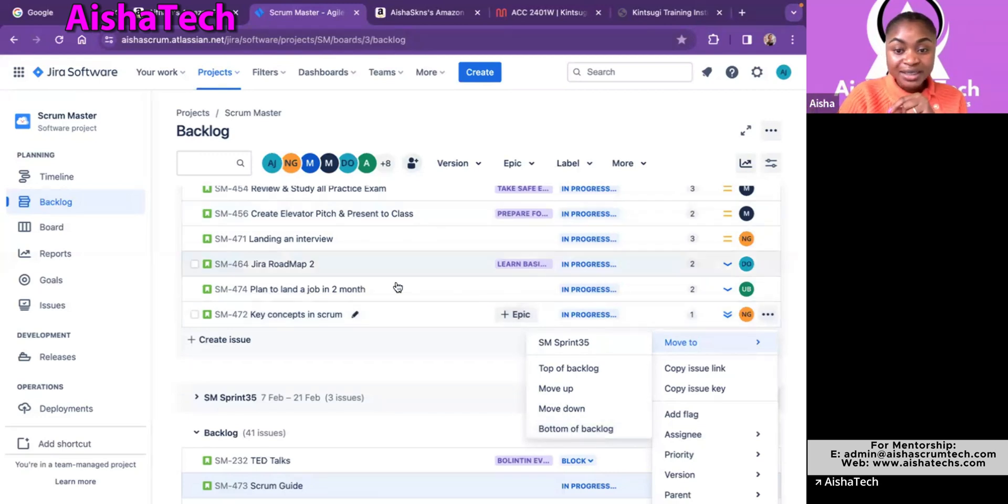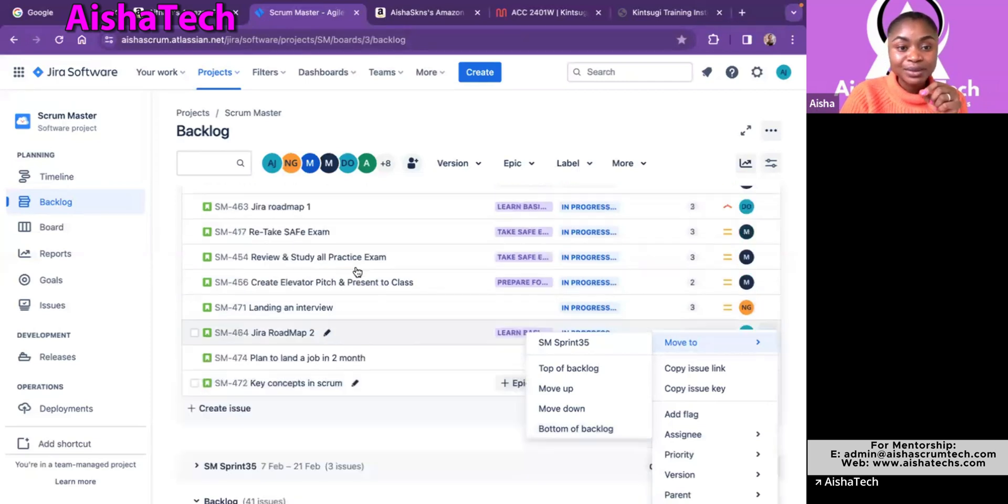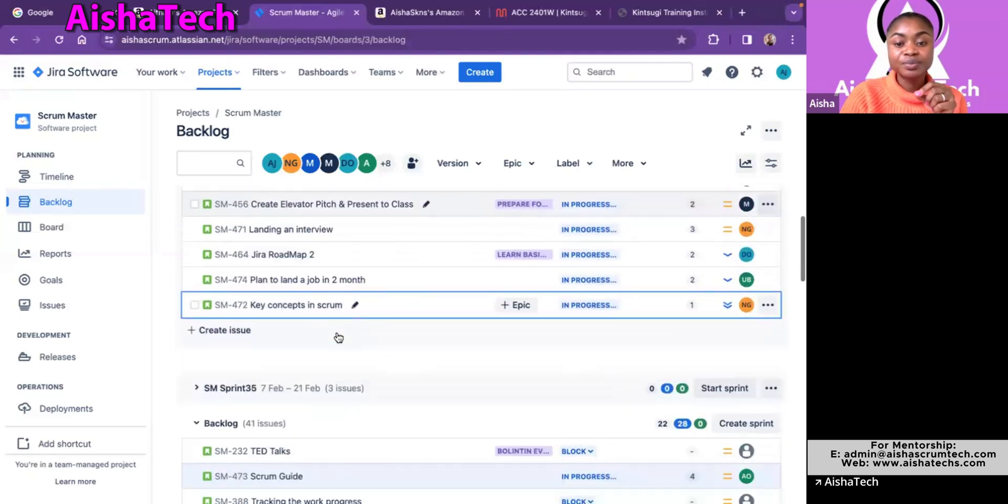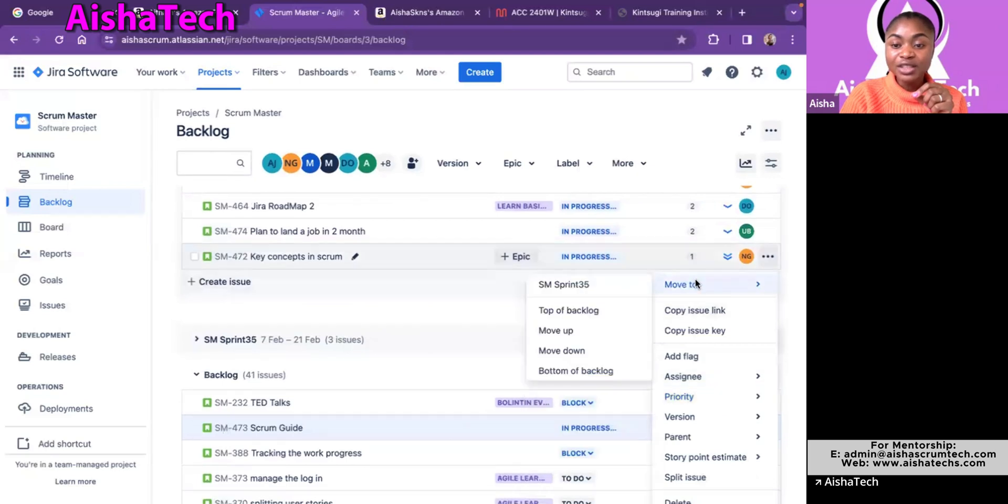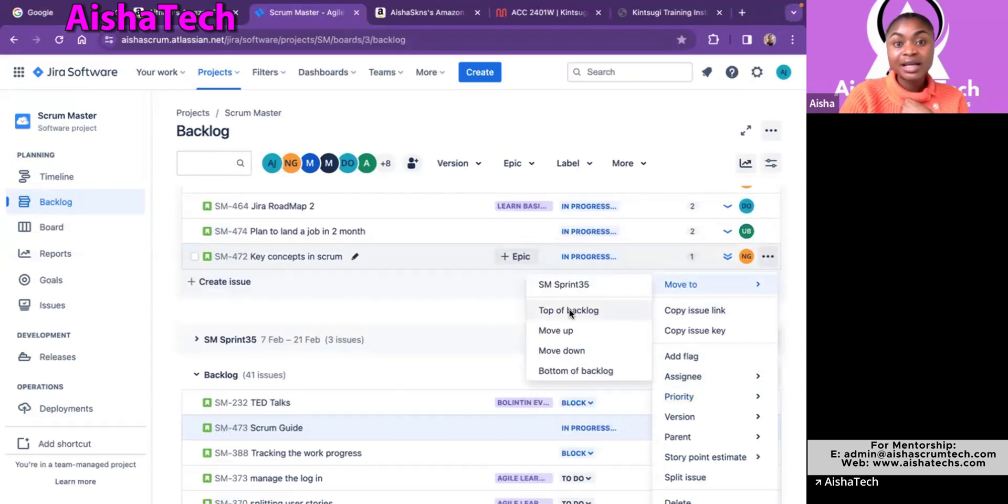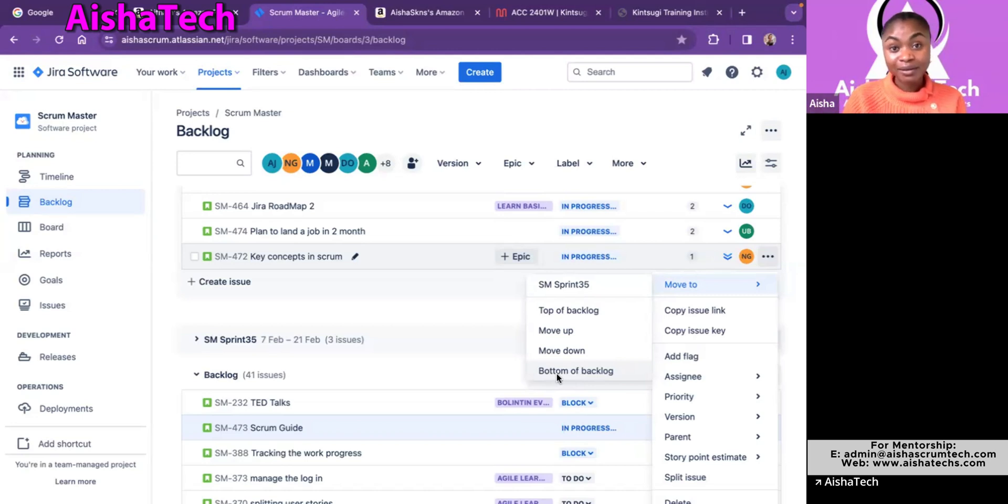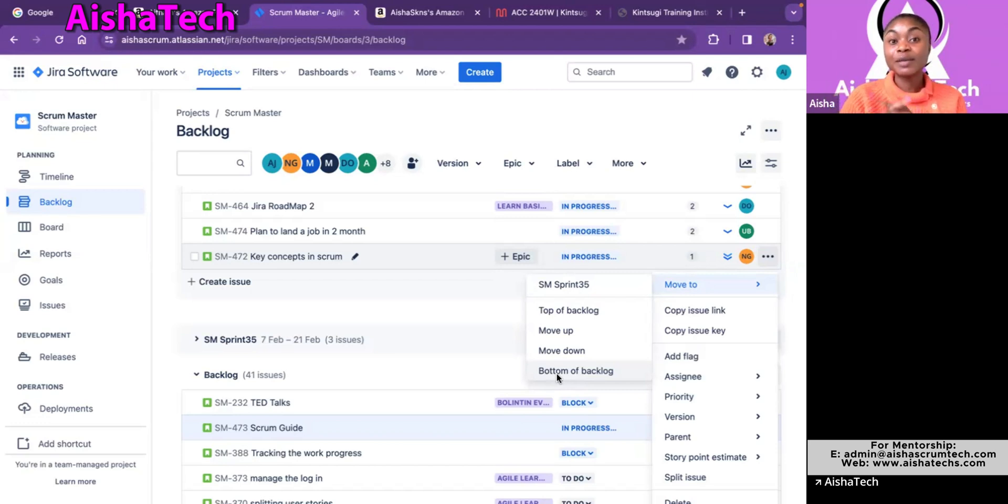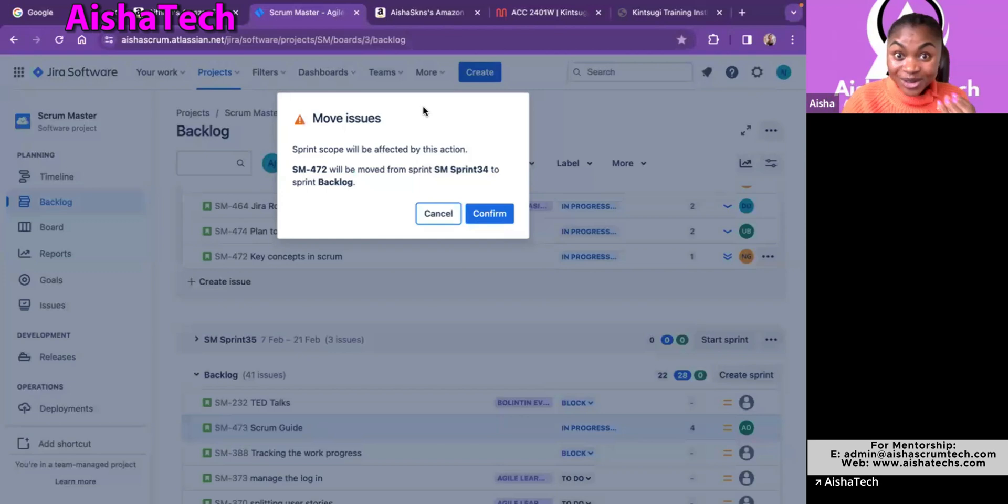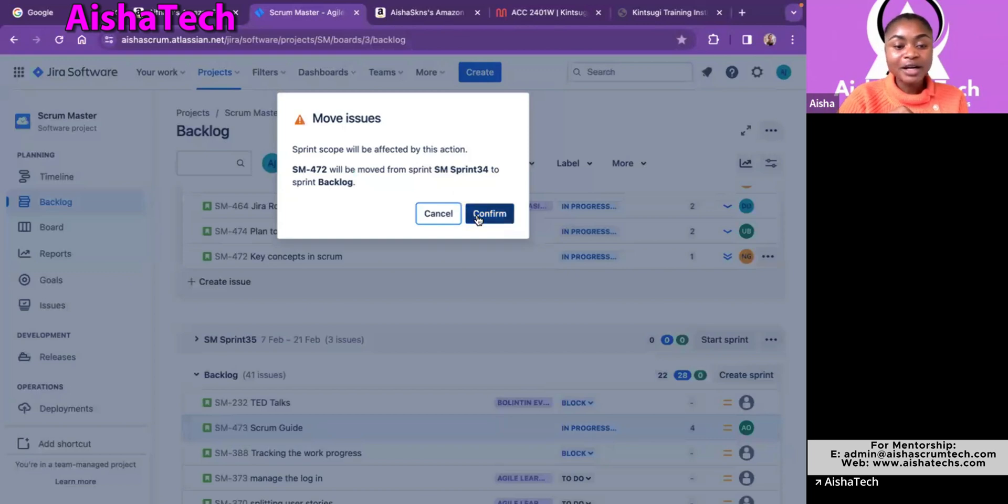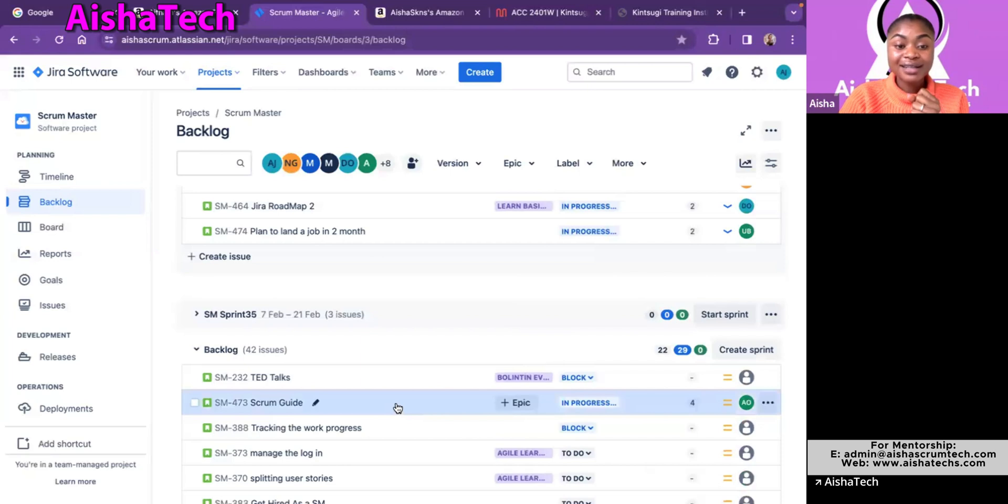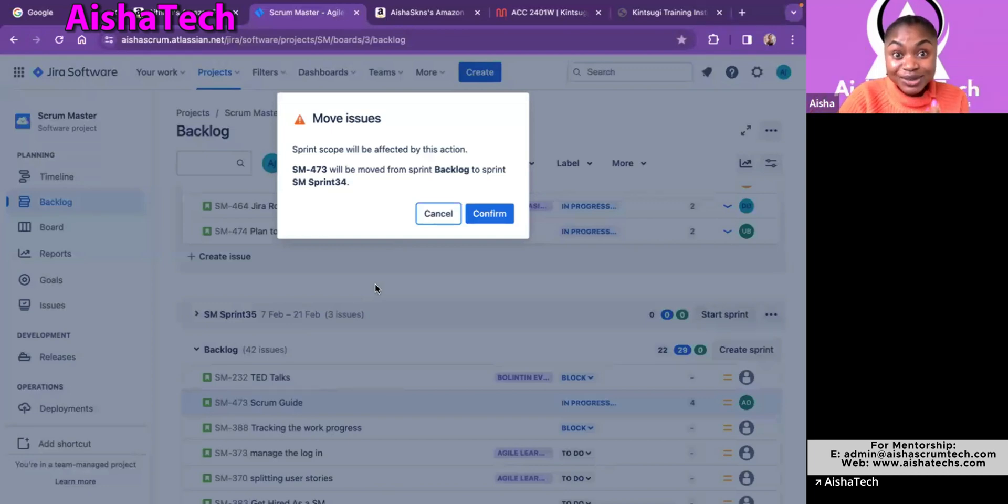And right now, where this sprint, this story, 472, this story actually currently is in a active sprint in sprint 34. So that's it. And I'm going to select this back and I'm going to move this to top of the product backlog. So that's going to be my own choice because we plan to work on this, let's say, next sprint. But if you know this is something that you don't want to work on and it's not ready to be worked on, you should definitely move this to the bottom of the product backlog. Then later on, during backlog refinements, your team can come together and discuss what you will do with that story. If you want to discard it or if you want to cancel it or if you just want to keep it for later. So now select. And now Jira also going to give the warning. Because we are now moving things out of the backlog. Then hit confirm and I did the change. And if I want to move it back, it's going to give me the warning. Because I'm changing the scope. And Jira is going to give me the warning. Now that I'm moving this story back to the sprint again.